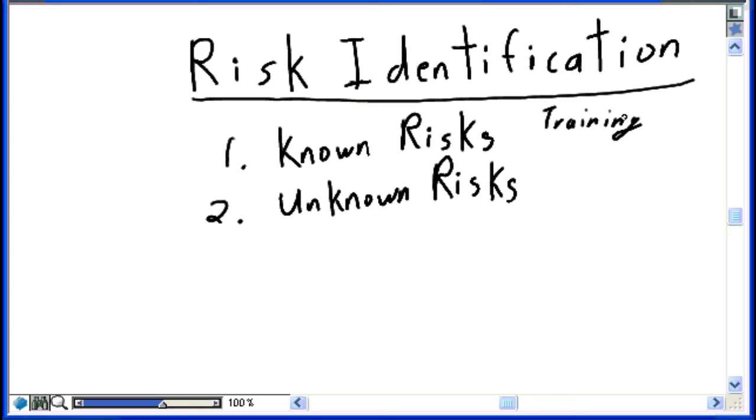That's the risk. The risk is at the end of 5 days, the team will still not be fully versed in the programming language. So therefore, you need to identify that there's a risk that you may need more training. You may need more time. You may need more dollars to provide more training to the team if at the end of the 5 days, when the team is back on the job site, they still aren't performing according to plan. Other known risks could be technology risk, server capacity.